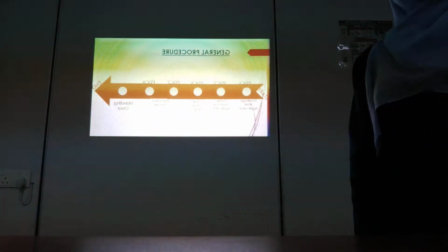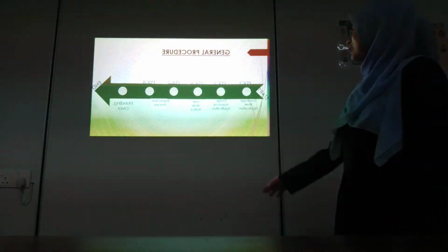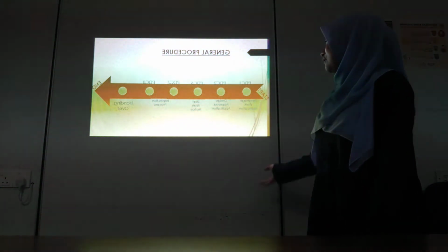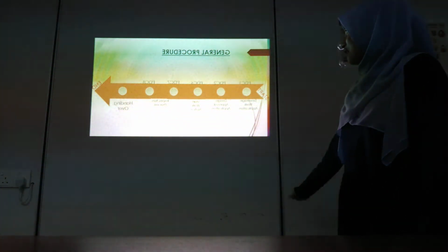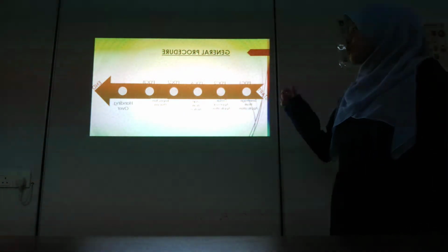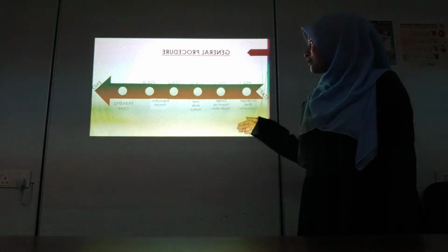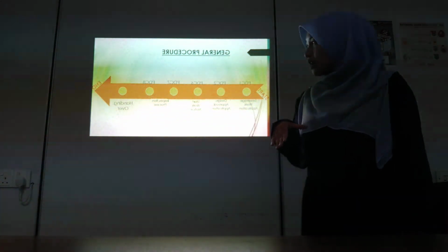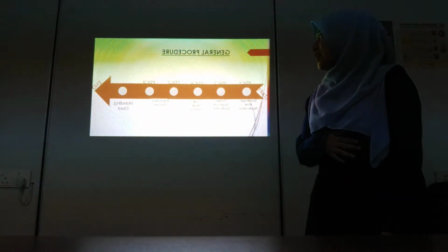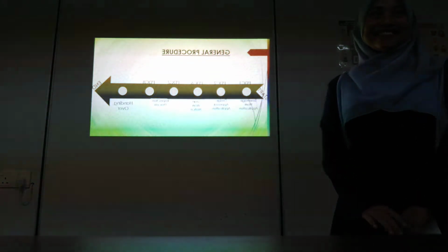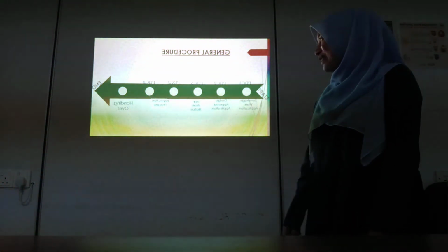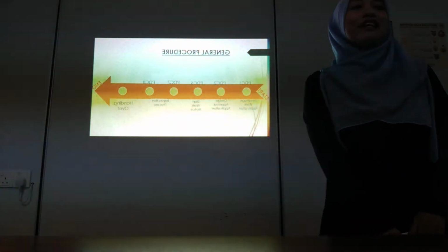Okay, so this is the general procedure. It starts with PDC1, which is the sewerage work application, and after approval, PDC2 design, and PDC6 for the start work notice, and 7 and 8 after the inspection process, mid and final, and lastly handing over until the end.